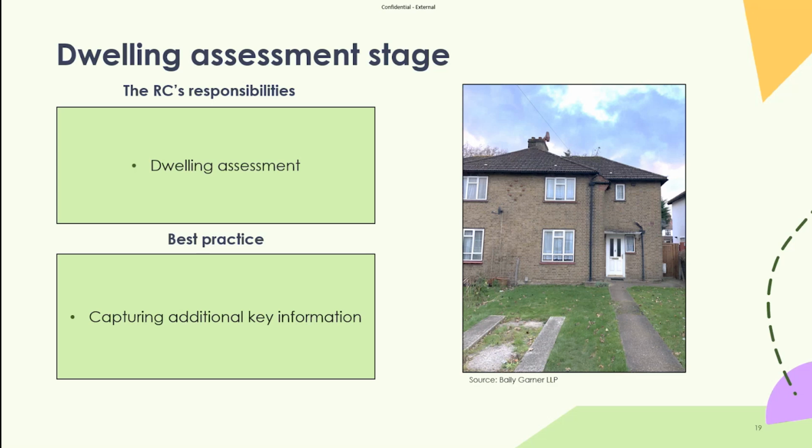What we've decided is, as part of that assessment process, our assessors will gather additional information to really complement the design and the next steps of the process, given those measures. They are going to be looking at things like where can we site a hot water cylinder, how big is a cupboard, which isn't a requirement of a retrofit assessor, but in terms of delivering this project in an efficient manner, that information is gold dust. And we're creating less disruption for the resident because we're doing that one inspection to begin with. So it's simple things like that that can really benefit the project.